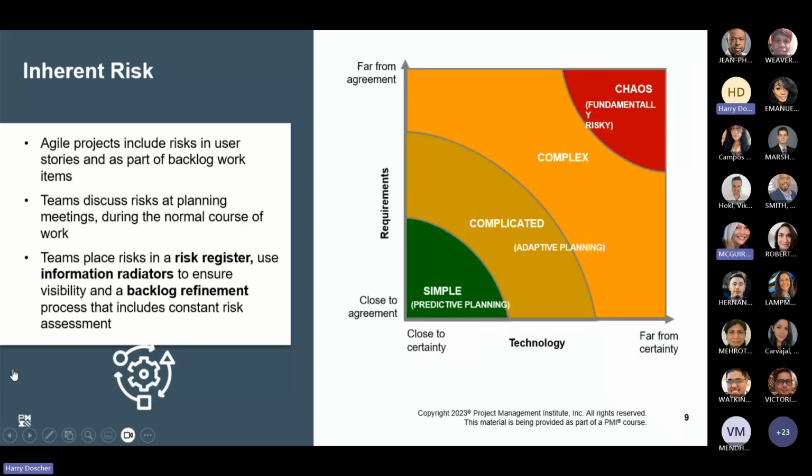So let's talk a little bit about adaptive projects. With agile efforts, you want to identify what risks can be expected for each of the user stories. There isn't the extensive planning up front, although when you're starting an adaptive project, it does not hurt to try to identify what risks can occur in the project itself. There's a lot more discussion about risks at each planning meeting.